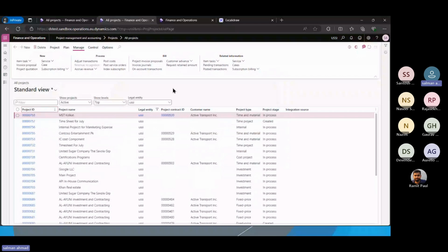And within that, we have these predecessors. So let's say we have finance here, and after that we need to create SCM. If we know that this SCM activity will start after this finance activity, we can attach the task that is the predecessor of this one. That's how we can effectively schedule and plan from the WBS.